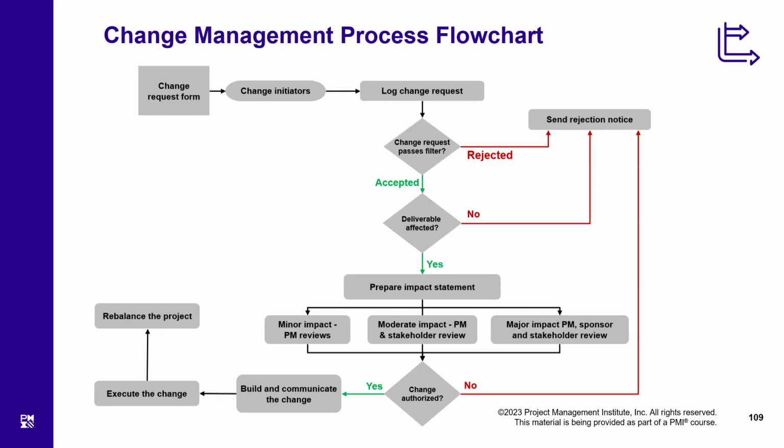So what you can do is define a funding limit and say all the matters smaller than this much funding, say $100,000, any decisions under $100,000 could be made directly by the project manager without consulting the product backlog. Then there are moderate impact things. They are to be addressed by the project manager and reviewed by the stakeholders. Again, the project board is not involved.